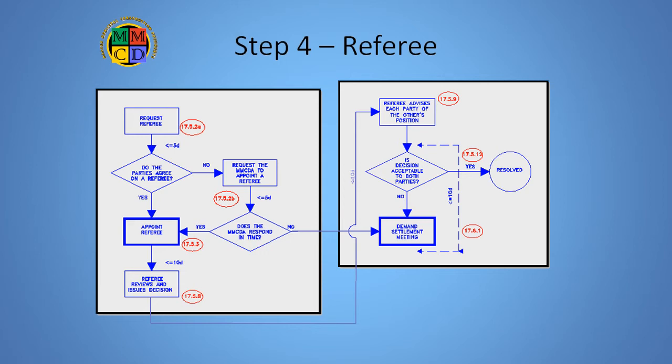The referee has several tasks, all of which must be completed within 10 days of appointment. Number one, investigate the facts of the dispute, including interviewing any personnel and reviewing all documents available to both parties. Number two, provide copies of all documents held by each party to the other party. Number three, provide a written opinion of how the referee thinks a judge or an arbitrator might rule if the parties cannot agree.